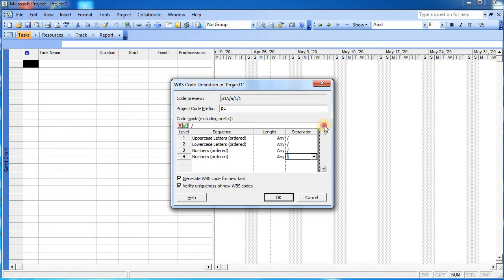Label means that this is the main task. Under this particular task, this is the subtask. Under this particular subtask, there is another small activity which is coming at this part, and then again a small activity in this section. Main construction of the bungalow or a building. This is superstructure work, suppose. Then under substructure work, suppose, this is the part of PCC, and under PCC work it is the part of formwork laying. So this is how we have created the various labels, and then we will click on OK.